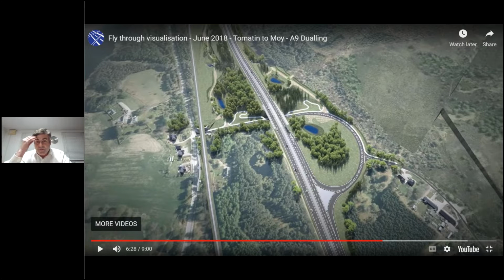So as part of this grade separation junction, they're creating a new access into Moy and closing the south access into the village and creating this new main access. Now, unfortunately, that places the majority of all of our work during this part of the contract in this very constrained area in front of the houses. There is another cottage here. So it creates a really logistical challenge in terms of how we get the plant machinery and in fact the bridge into place.